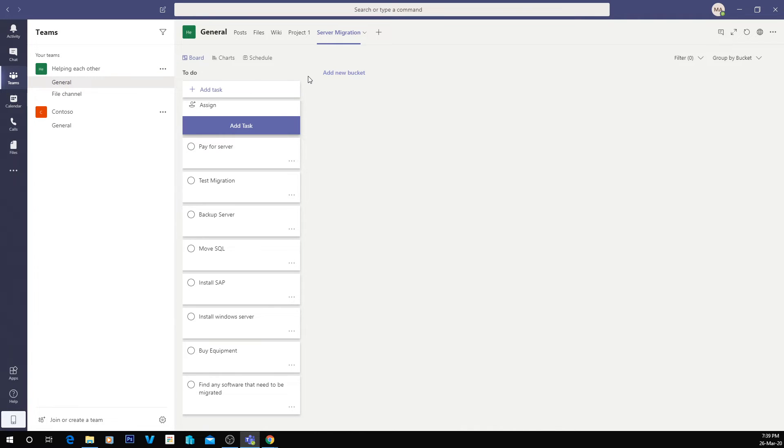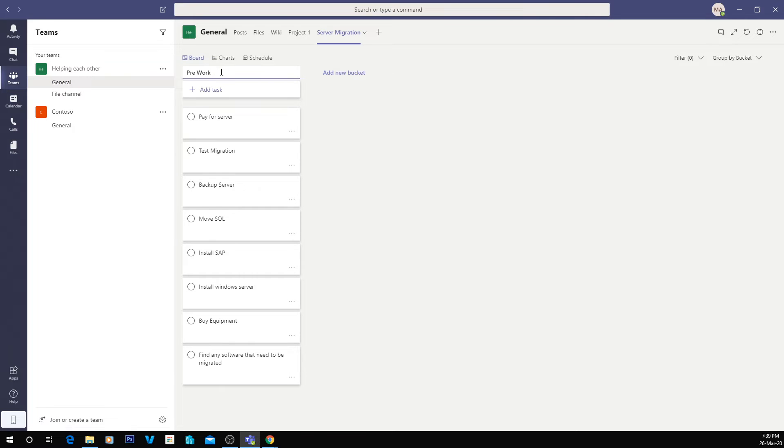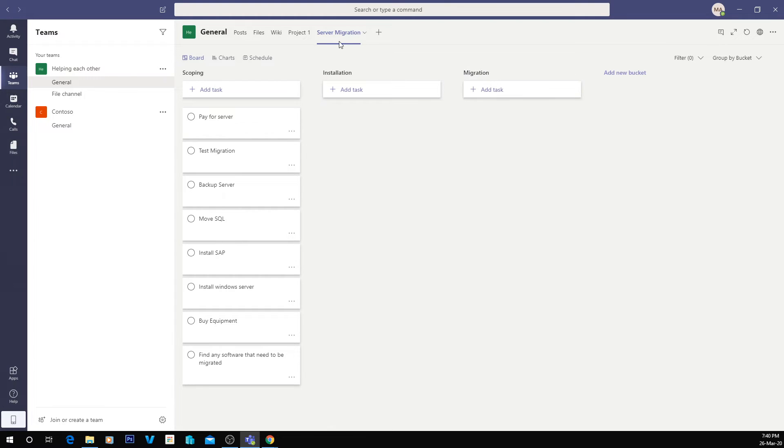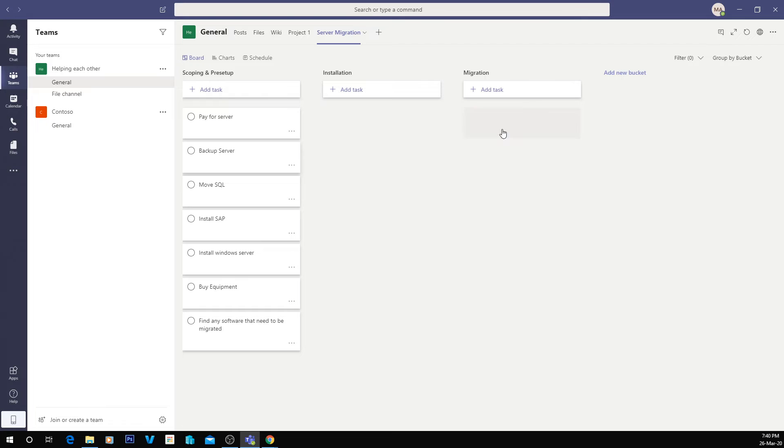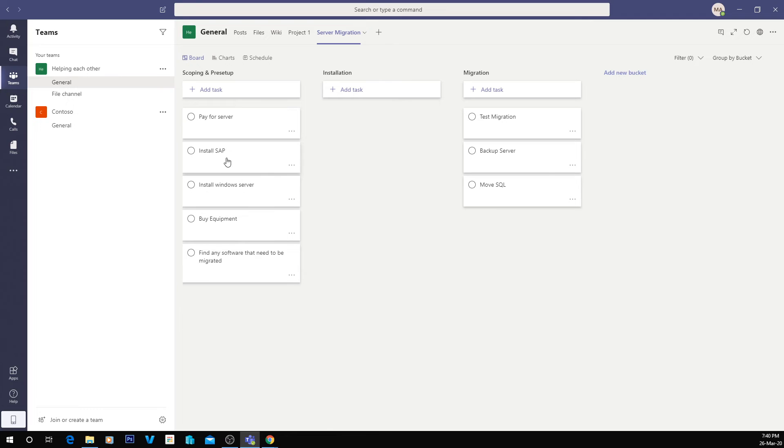So what I'm going to do is break it up into stages. So I'm going to call it pre-work or scoping, installation, and migration. So they're just going to be our three things. So scoping and pre-setup. So what we're going to do here is we're going to move some of these around to different things.